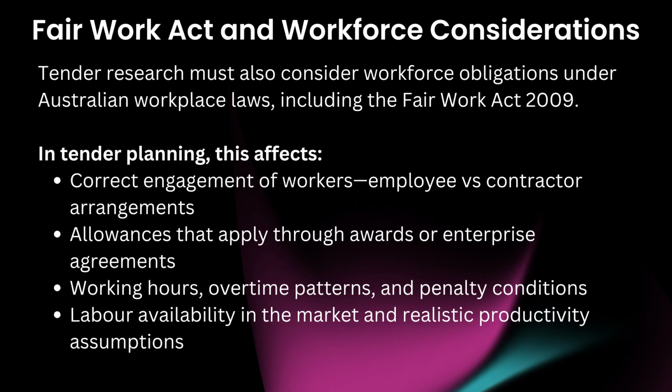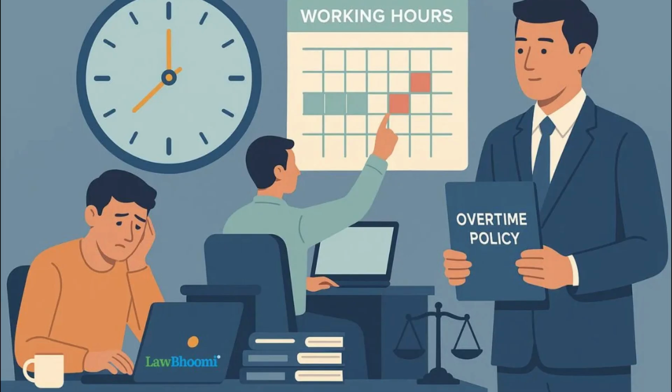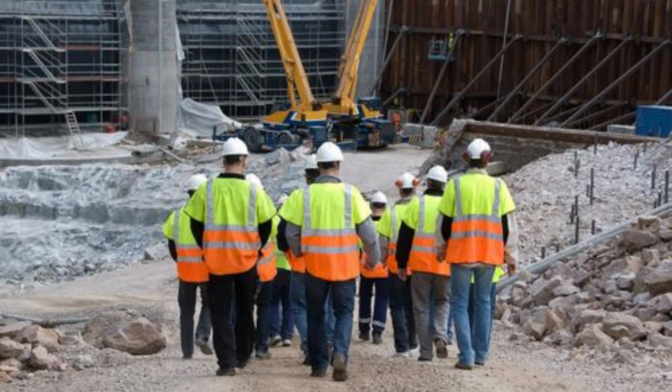In tender planning, this affects correct engagement of workers, employee versus contractor arrangements, allowances that apply through awards or enterprise agreements, working hours, overtime patterns and penalty conditions, labour availability in the market, and realistic productivity assumptions.